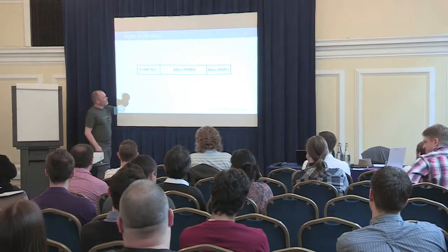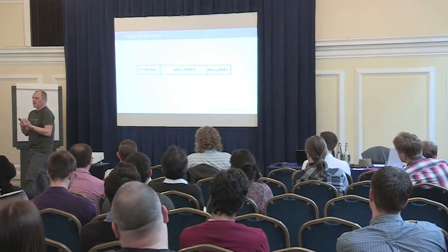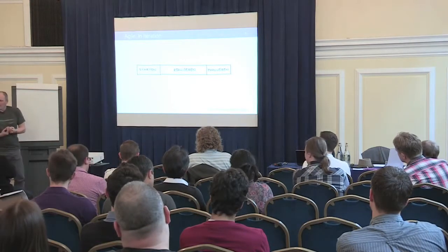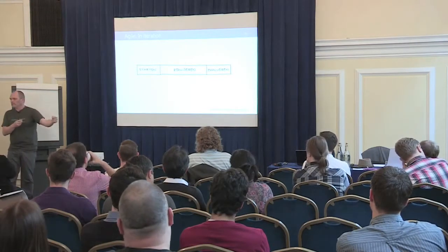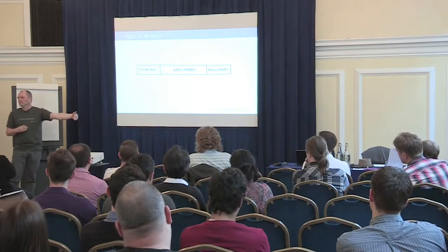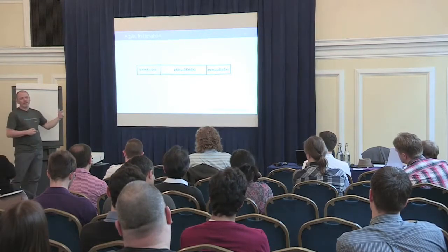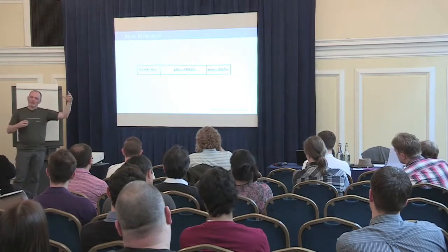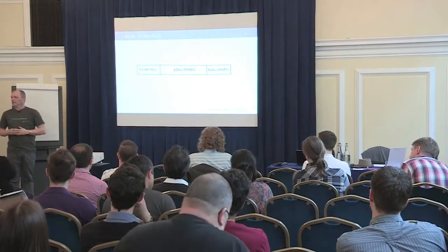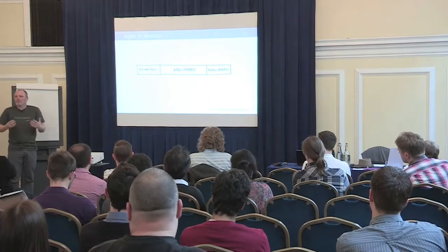But anyway, you evaluate what you've done, and maybe even more important, you evaluate the way that you've done it, right? In an Agile project, you try to learn continuously. You try to improve on what you do every iteration again and again. That's totally different from a waterfall project, where they usually, if they do at all, evaluate at the end of the project, which is, in my opinion, totally useless. Because the project has already ended, so there's nothing more we can improve on the project.